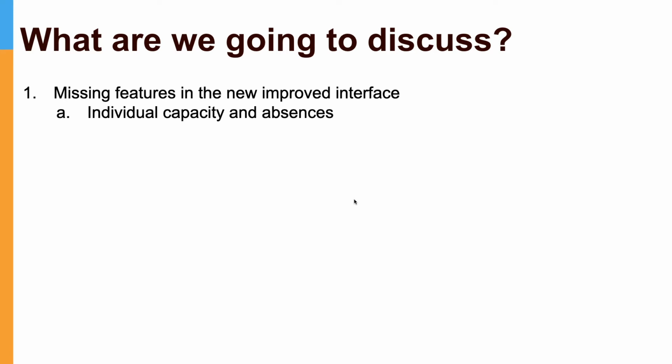In the life plan, you can define the individual capacities, you can define their working days, or rather the days they are not working, and portfolio will take care of those missing days when the person is not working while making a plan for you.